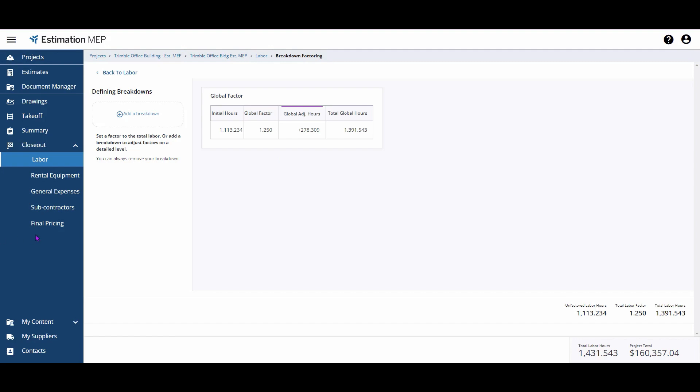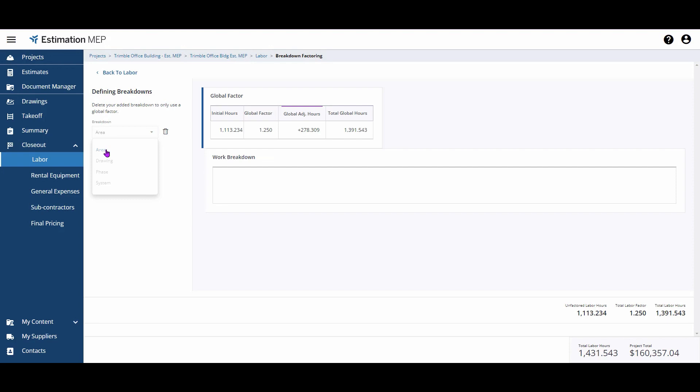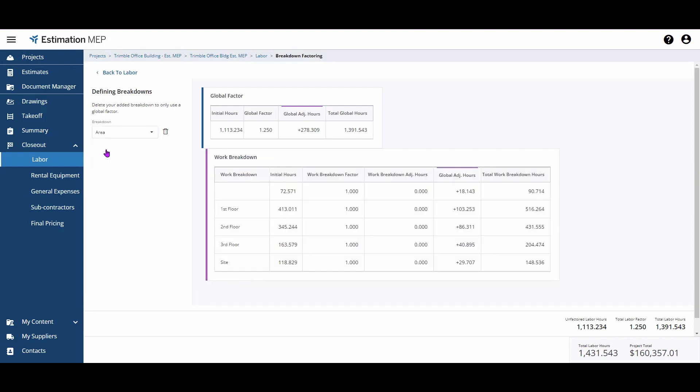The final option for modifying labor is the Work Breakdown section within your breakdown factoring. To access this area, first choose a breakdown you'd like to factor on the left-hand side of the screen. Then, apply the factors you'd like. For example, if my work is occurring on a few different floors within this building, I might want to apply a slight factor to account for hauling material up and down the stairs.